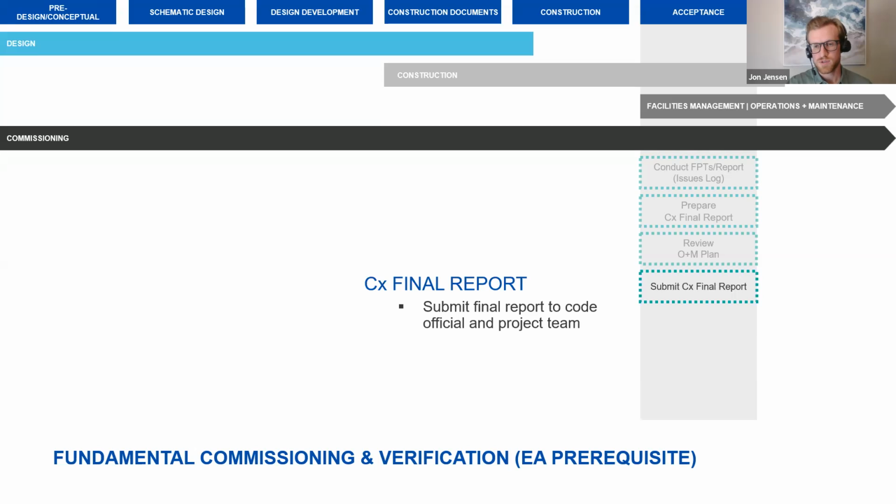So once we've had all those issues addressed and responded to by the contractors, we close all those out, and then we issue our commissioning final report to the team, signifying completion of our fundamental commissioning.